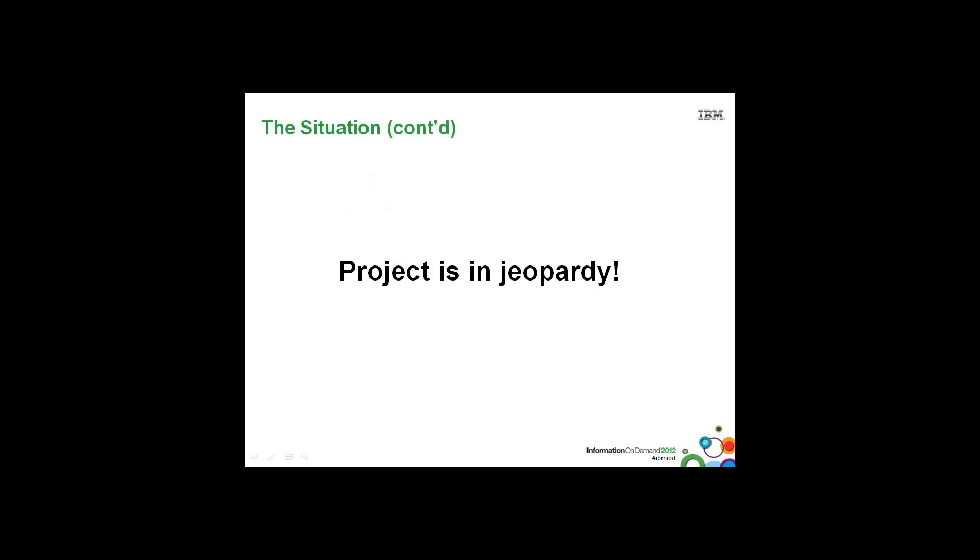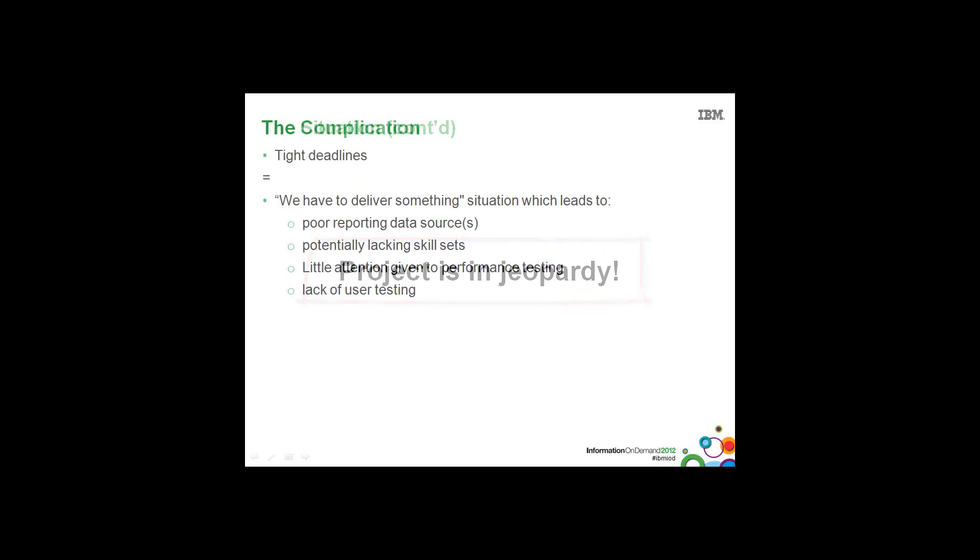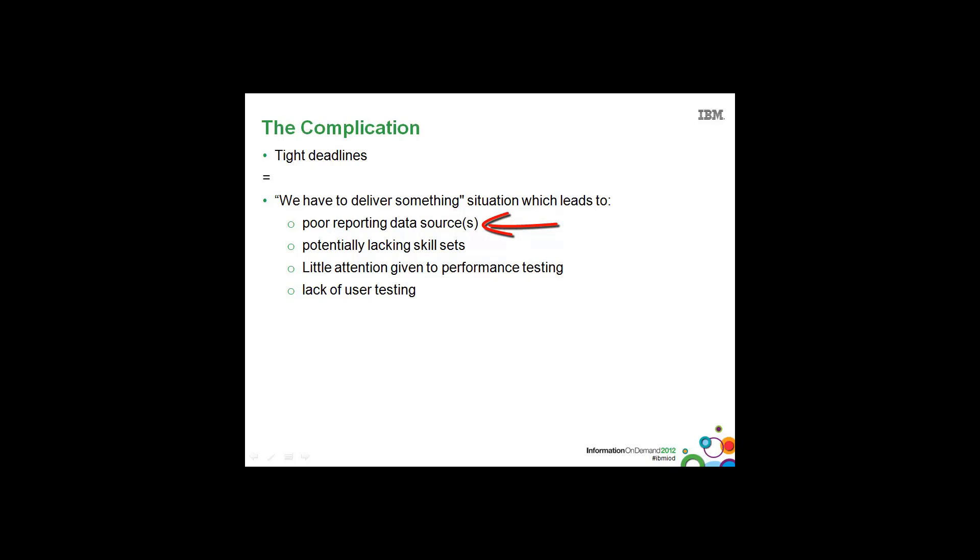So the complication in this situation is the tight deadlines equal a 'we have to deliver something' situation. And that situation will lead to poor reporting data sources or data access strategies. Potentially lacking skill sets for the tools that are going to be used in the BI project.